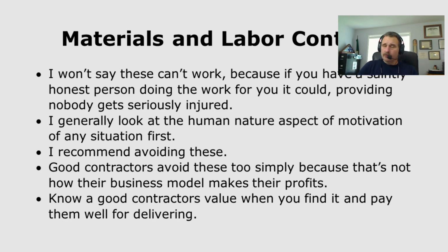You have to be real careful with these because it can be construed that somehow you were the employer. Just let somebody get hurt on the job. They get a lawyer. The lawyer's going to go after anybody that's got change in their pocket, and that includes you. They will use tactics such as involving the IRS, because if they're paying it like you were the employer, now you have to worry about, oh, you didn't have workman's comp insurance.